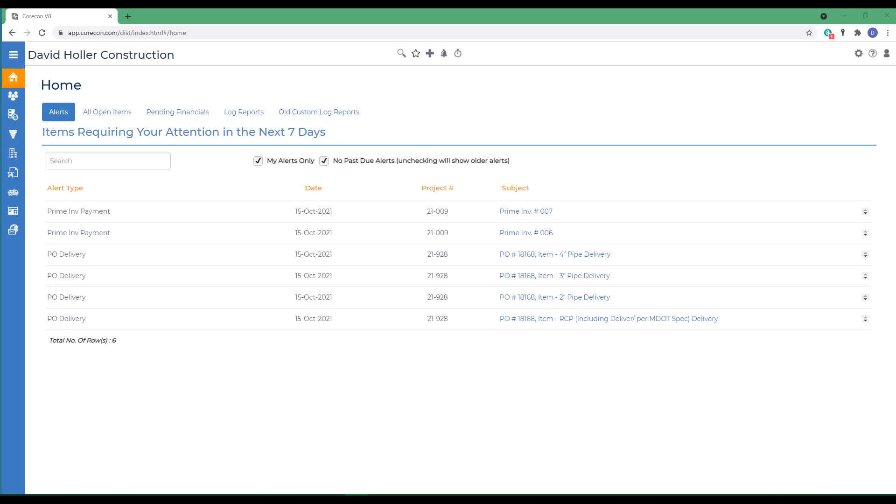When there are multiple structures or phases, a project will typically have multiple prime contracts to track financials for each. CoreCon doesn't require multiple prime contracts. A majority of our subscribers only need to create a single prime contract under a project. There are special situations where multiple prime contracts under a project come in handy.